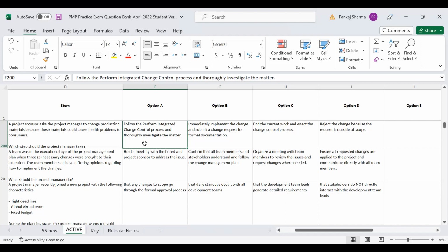This change request goes to the change control board. The change control board will review and assess the change. Based on their review and assessment, they will either approve or reject it. If they reject the change, the change is rejected. If they approve, it will be approved, right? So the project manager will not do it himself. He'll get it done. But in this context, because it's something related to health, right? Bravo, Charlie, Delta are ruled out. Alpha is the correct answer. Right, guys? Agree.